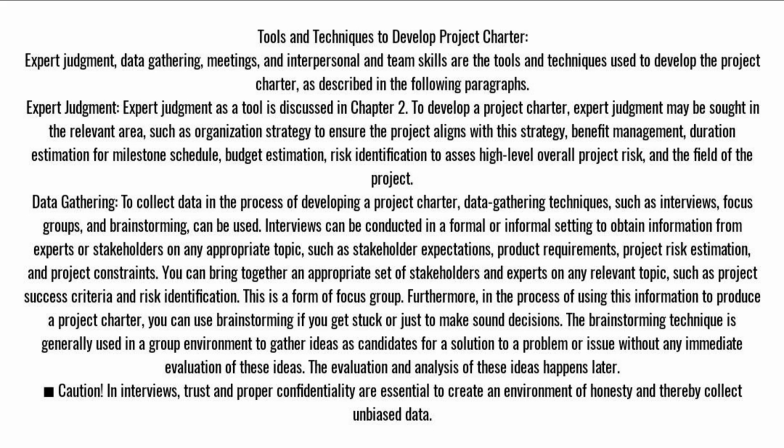Data gathering. To collect data in the process of developing a project charter, data gathering techniques, such as interviews, focus groups, and brainstorming, can be used. Interviews can be conducted in a formal or informal setting to obtain information from experts or stakeholders on any appropriate topic, such as stakeholder expectations, product requirements, project risk estimation, and project constraints. You can bring together an appropriate set of stakeholders and experts on any relevant topic, such as project success criteria and risk identification. This is a form of focus group.